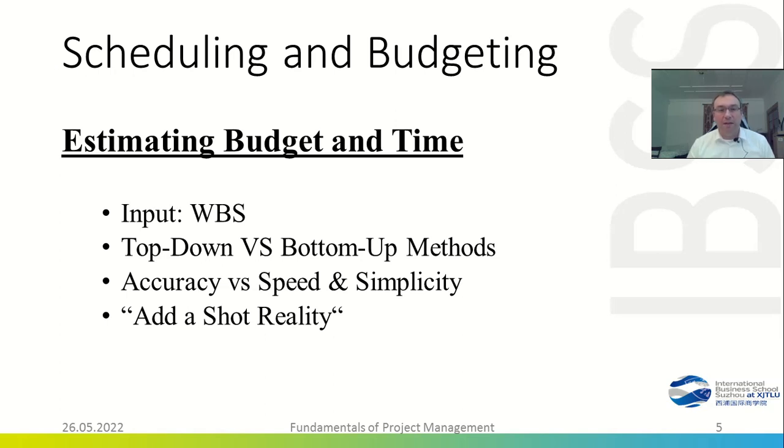Now I want to look at the top-down as well as the bottom-up method, because when you have an initial idea, there is not much sense in detailed planning of any kind of project. So you will go from a very fast but very inaccurate method to a more and more accurate method the closer you get to the project.